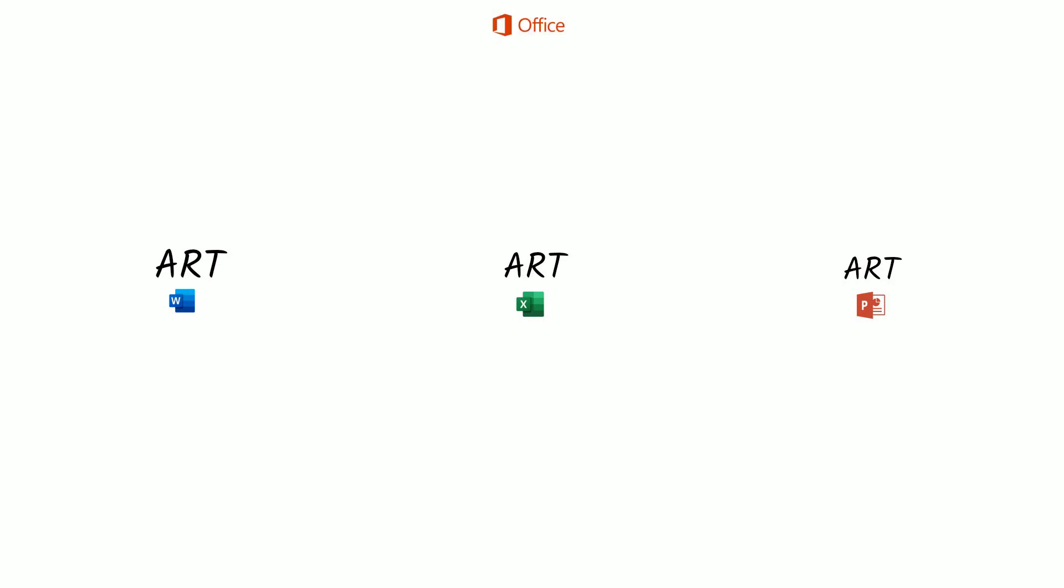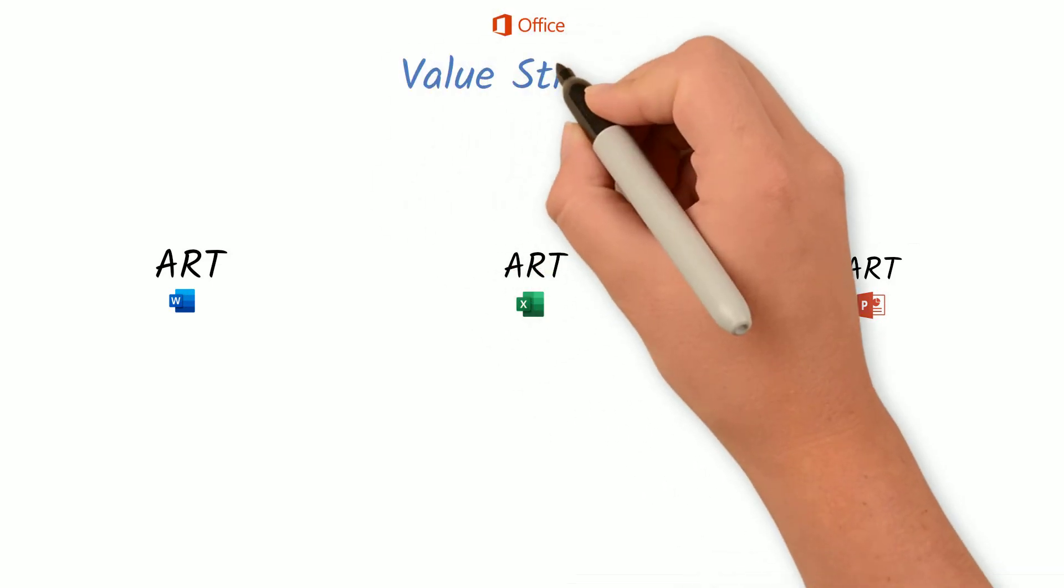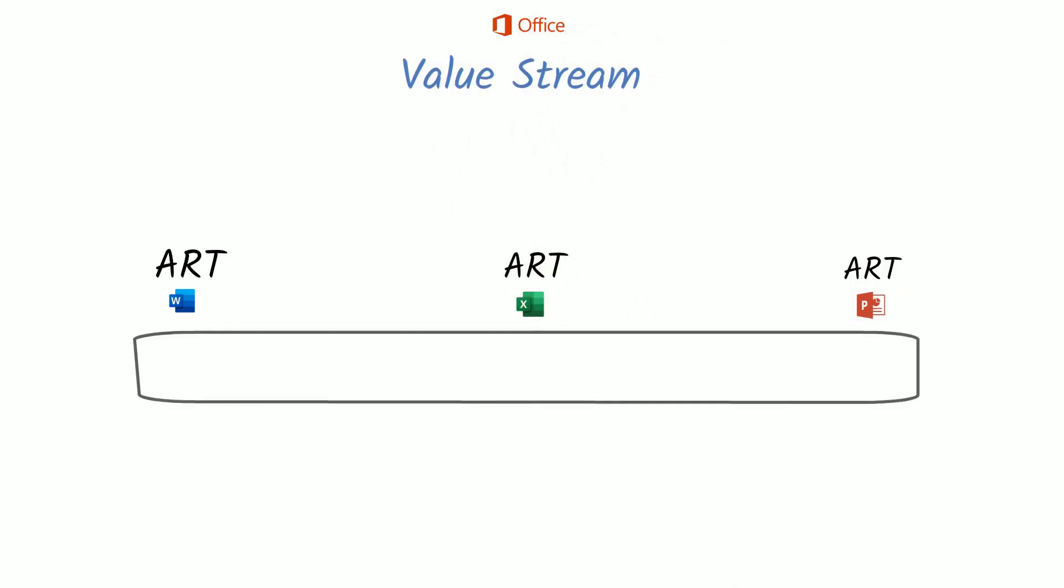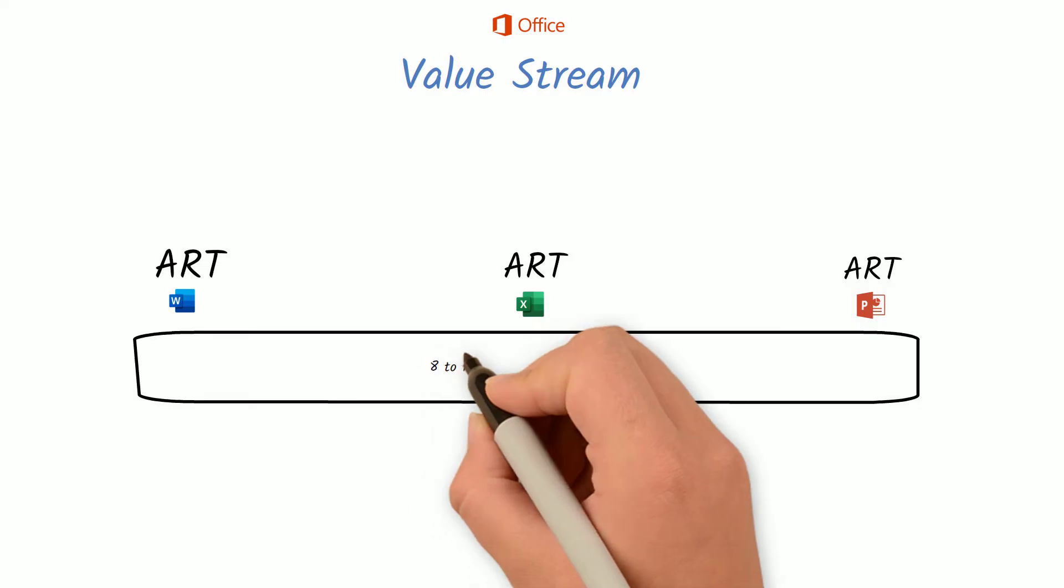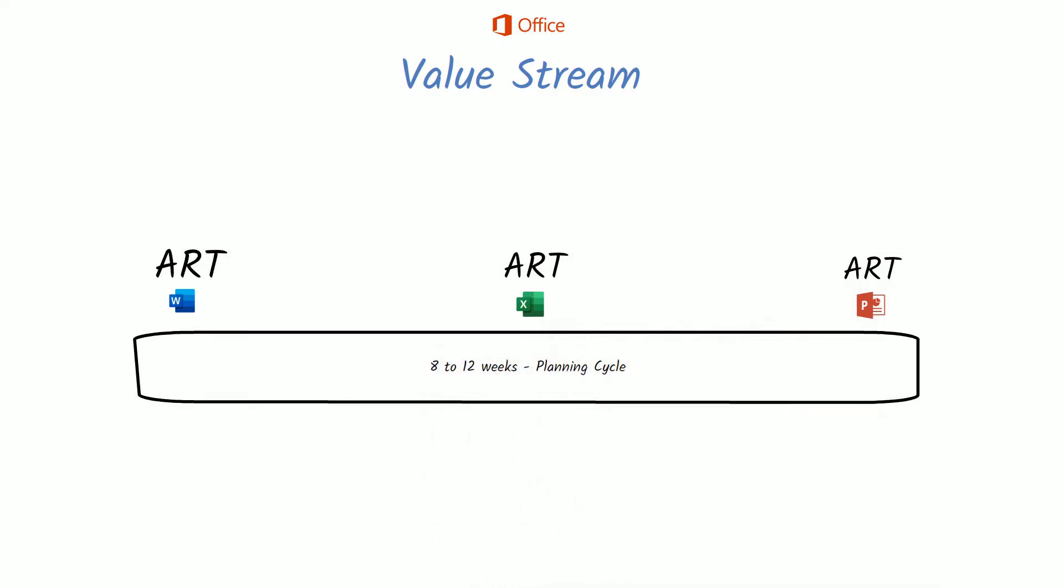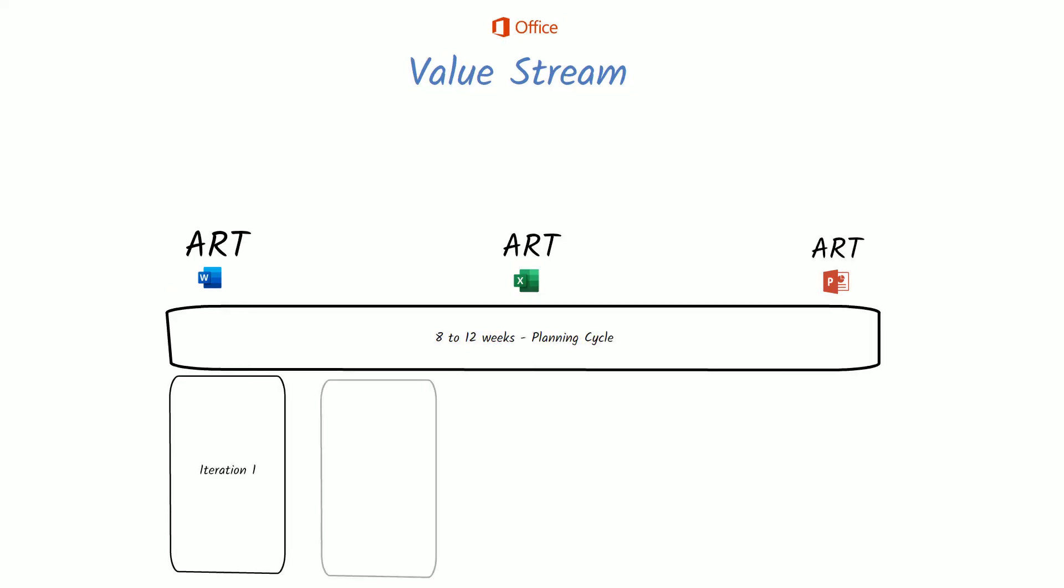All the ARTs under one value stream work together in the same planning cycle. They plan and work in cycles of 8 to 12 weeks long, which are composed of 5 iterations or sprints of 2 weeks each.